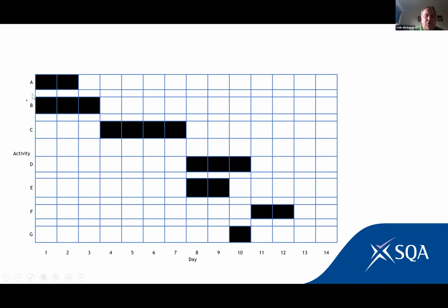And we can see there, we saw from the table that A took 2 hours to complete the task, and B took 3 hours to complete the task. So for A, we've shaded in 2 boxes, for B, we've shaded in 3, and C is not allowed to start until both of those tasks are finished. So C can only start when the last of those first 2 tasks is completed. So therefore, it starts at 3 hours, and it lasts for a further 4 hours. So that's a question we'd be hoping that the vast majority of candidates wouldn't have any great issue with.